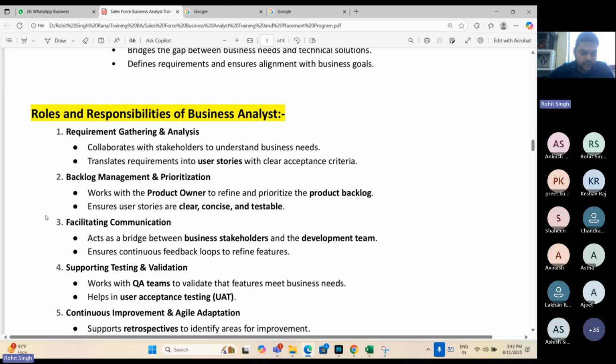So I have now 100 tickets as of now. Okay, on 11th of August I have 100 tickets. So what is product backlog, or what is product backlog prioritization, or what is product backlog management? It's not that I will do 100 tickets in one day. Okay, the client has given me, Rohit, you are the program manager, and as per the estimation, you have 10 months. So I'll say, okay, not an issue. I'll divide all those 100 tickets into 10 tickets per month over 10 months.